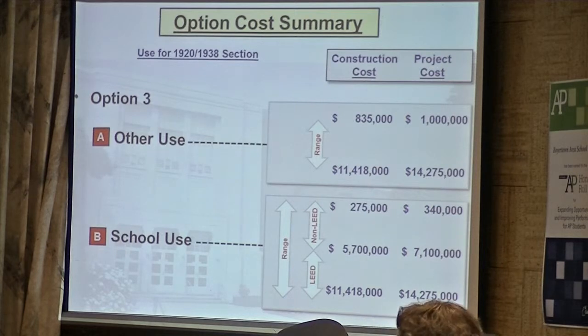So you're gonna have to invest at least about $1 million for other use, and you could probably get down lower just by moving into it, but it needs work. It does need work. If you get in it for that, you're gonna spend money over time repairing things. So it's not a done deal at $1 million for the next 20 years. You're gonna move into it at the low end, and then you're gonna have to budget money every year to continue to fix things in that building as they continue to wear out.